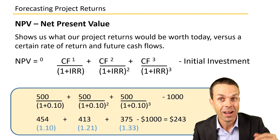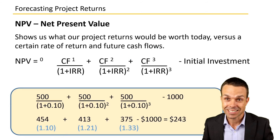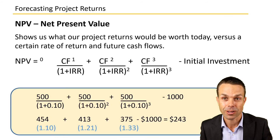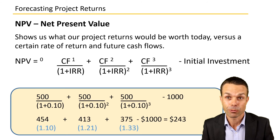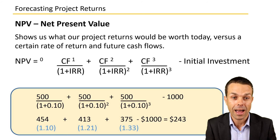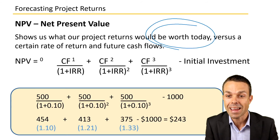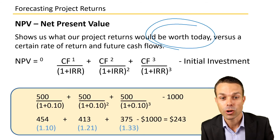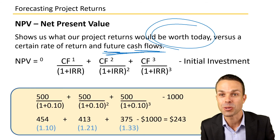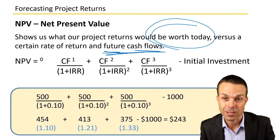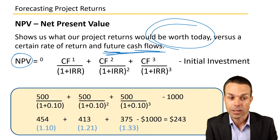Net Present Value is a really useful financial technique to figure out what project returns would be worth today versus a certain rate of return and the future cash flows we expect to receive from the project. Net Present Value equals the sum of each period's cash flow divided by (1 + internal rate of return) raised to the power of that period.